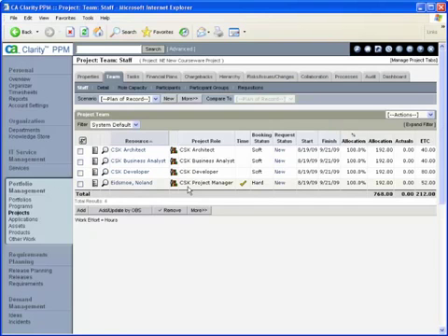Now we will go back into Clarity and the project team staffing page to look at 4 more terms that are key to resource management. The first one is allocation, and we see allocation is a column in the staffing table. Allocation is what happens by adding a resource or role to a project. It's at this project level. So allocations are project level resource adds to a project.